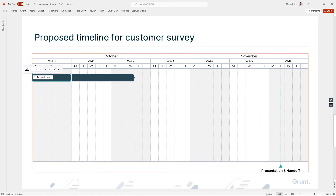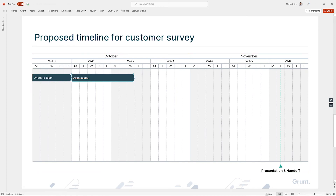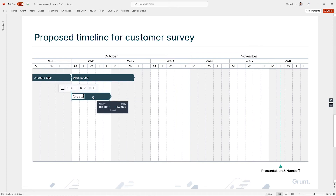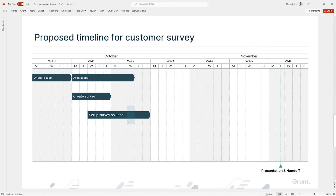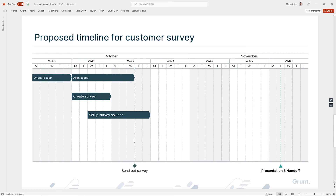Let's call the first one 'Onboard Team' and the second one 'Align Scope.' Now we can create more processes in new lanes as well. We'll need a 'Create a Survey' process, and then we have to set up our survey using our tools, so I'll type 'Setup Survey Solution.' Then we know that we need to send out the survey, so I'll create a milestone down at the global lane and call it 'Send Out Survey.' This has to be sent out by the end of Wednesday, which means I probably have to complete setting up the survey before that, so I'll drag that back.